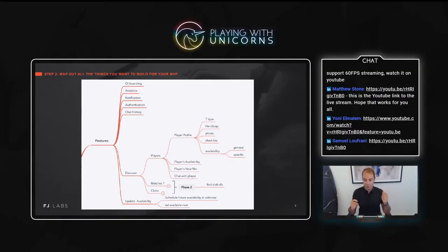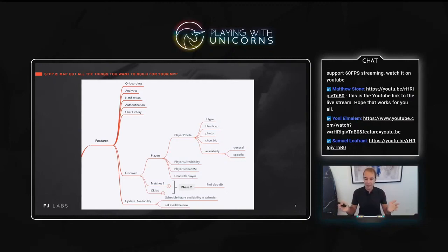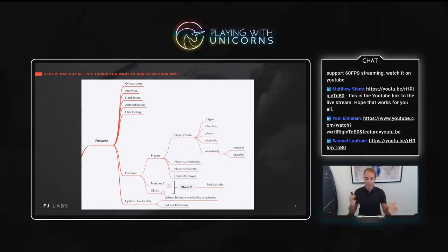For phase two, we decided we don't need a database of clubs or the ability to book clubs today, because that's offered in other apps and isn't needed to test the core idea. The core question was: can we find players at our level?